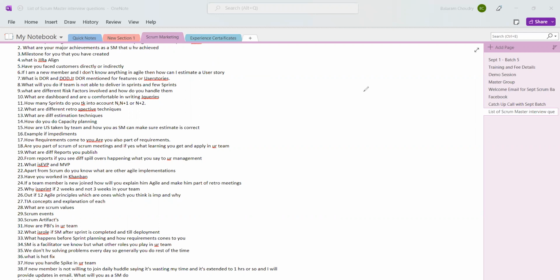Let's say, for example, if you take 8 for every developer, what does it mean? It is their 100% capacity. Now you want to reduce that to 60% or 50%. General practice is, as a seasoned Scrum Master, if the team is newly formed, we should not plan beyond 50% of their capacity. Correct. Yes. Okay. Noted. All right.